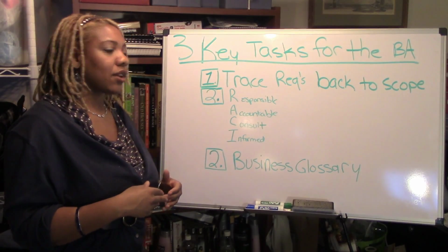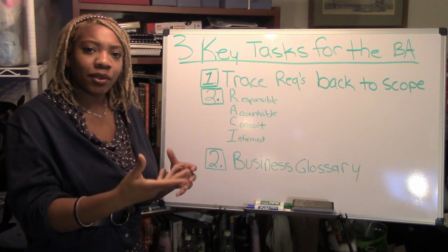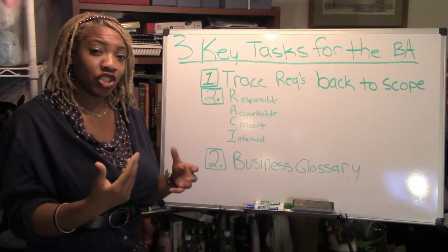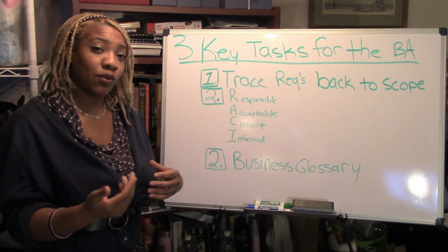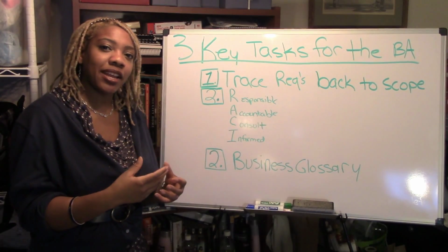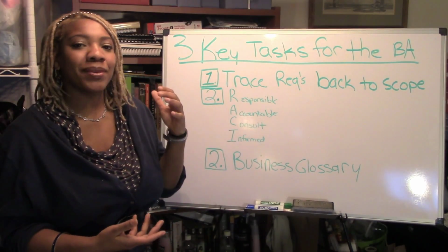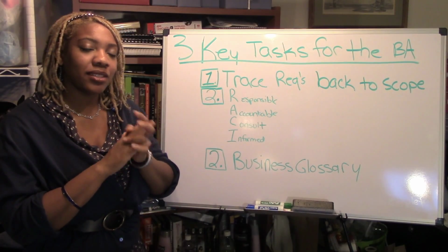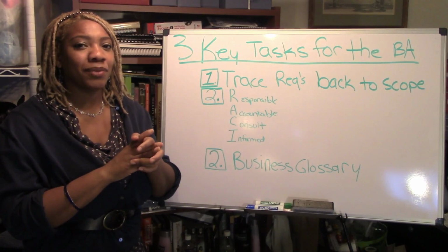But basically, it traces everything back to who made the requirement, who is the responsible party, who can make the decisions, and who needs to be kept aware of this requirement as it goes forward. So for every single requirement that's created, I've seen Excel documents extremely long with RACI requirements, and I'm always extremely happy about them because we know exactly who to consult, and someone is listed as the person who makes the decision. And at the end of the day, it's honestly the decision maker that's the most important.